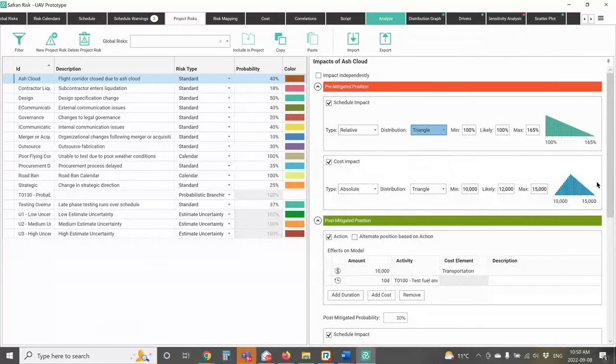I typically would use a triangular distribution, a uniform distribution, or a trigen distribution. Those are the ones that I use the most. However, depending on what I'm trying to model, I may use a different one as well. So if I'm trying to estimate, for example, how long it's going to take concrete to cure, well, that's a natural thing, so a normal distribution would make sense. Anything that occurs in nature follows a normal distribution. So it kind of depends on what you need. Unfortunately, there's no easy cut and dried answer for that.